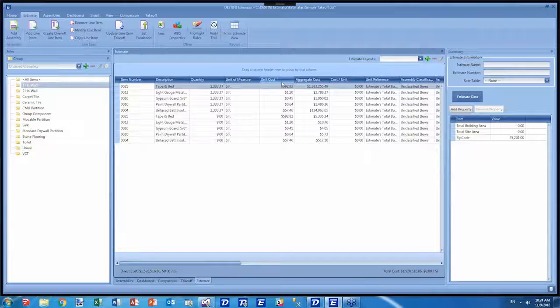And in the previous presentation, I talked a little bit about how you can incorporate things like waste factor, and the example I gave specifically was around calculating the total labor. So one of the things that's very valuable for a lot of our clients is to figure out exactly the total labor cost for any one item, and they do that by taking the labor price, multiplying it by the quantity to arrive at that total labor cost.